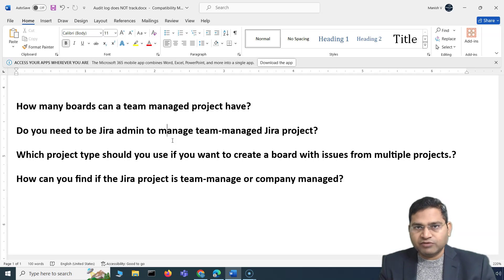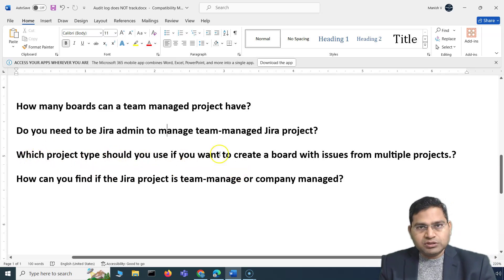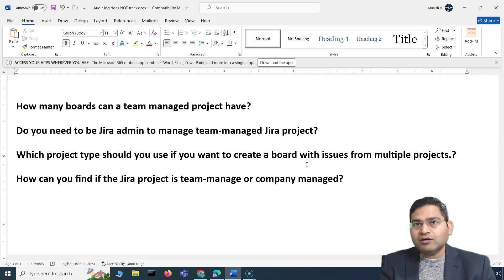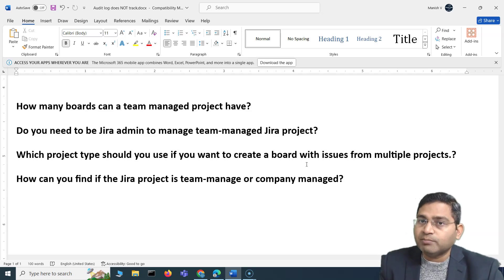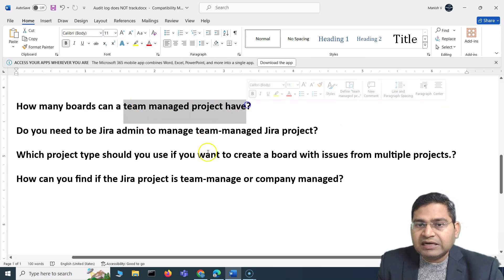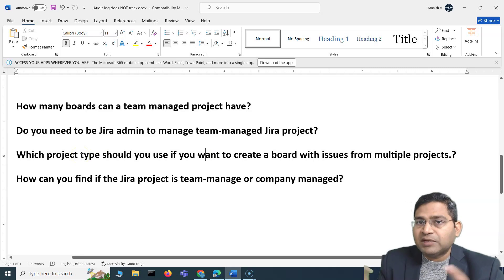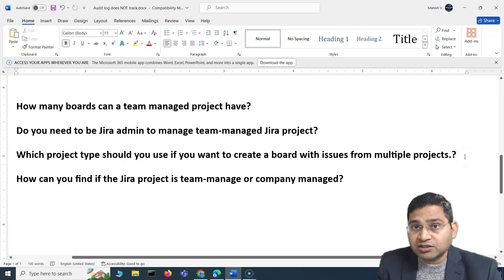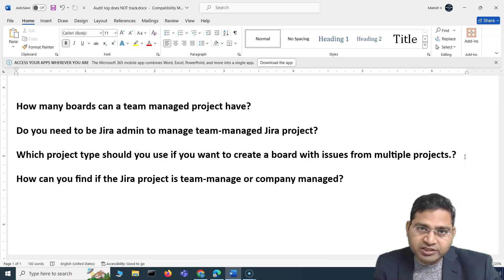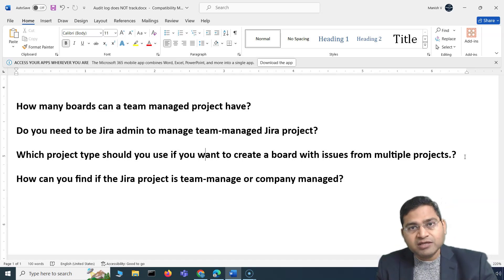Any permission scheme or notification scheme is shared in Company Managed projects. Now a scenario-based question: which project type should you use if you want a board with issues from multiple projects? In a Team Managed project, the board can only show issues specific to that project — you cannot have issues from other projects on the board. If you need issues from multiple projects on a board, you must go with Company Managed projects. This is why this knowledge matters — so you can ask the right questions and recommend the appropriate project type.